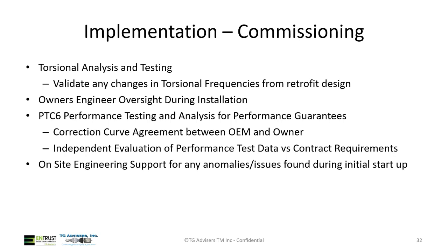Also, we usually recommend having an owner's engineer on site during installation just to oversee the process, make sure that everything's going all right as a technical check around the process, make sure there's no startup issues on commissioning, support that commissioning process.